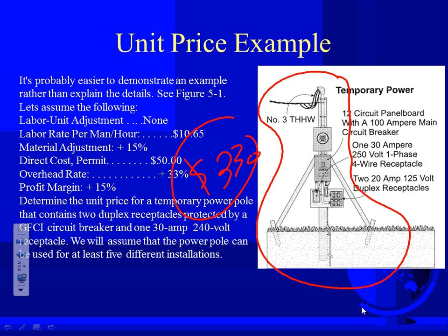Now that will be direct job cost. In a real estimate, you throw it in as direct job cost, right? At the end, what are you going to recoup this? Because you don't build many of them. You build one and use it 5 times. After 5 times, the assumption is you're going to throw it away and build a new one. The assumption. You could salvage some. That would be extra money, but the assumption is 5 times. Now the ones that Parsons and all those guys have, I don't know what their assumption is. They can pull it to a lot of stations. They take a lot of abuse as you move them. After a while, the wheels don't work on them. So you might either take them to the shop and fix them, or basically build a new one.